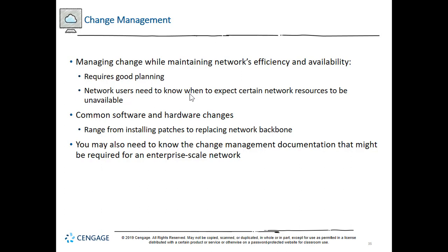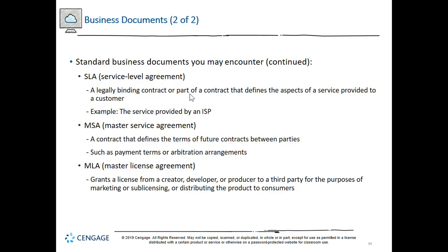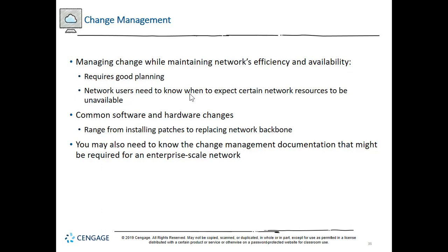Change management. I deal with this one all the time. You're setting up a network for a company, and you agreed that this is going to be the work you were going to do based on your master service level agreements. And then you're doing all this work, and then they come in and say, oh, we need this done, and this done. Well, that's all well and fine. That's an added price, folks. And the whole point of change management is to not have a ton of changes. So good planning will prevent all these changes from occurring. But not everything always goes as planned.